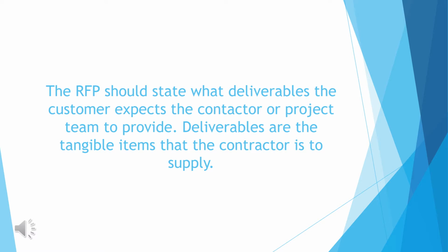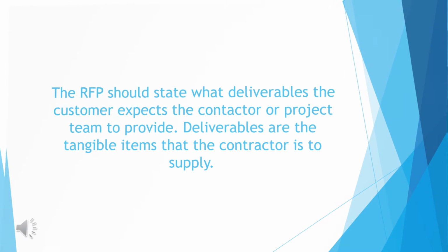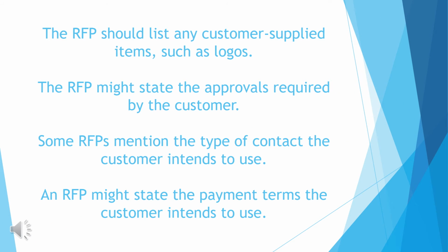The RFP should state what deliverables the customer expects the contractor or project team to provide. Deliverables are the tangible items that the contractor is to supply. The RFP should list any customer-supplied items, such as logos. The RFP might state the approvals required by the customer.